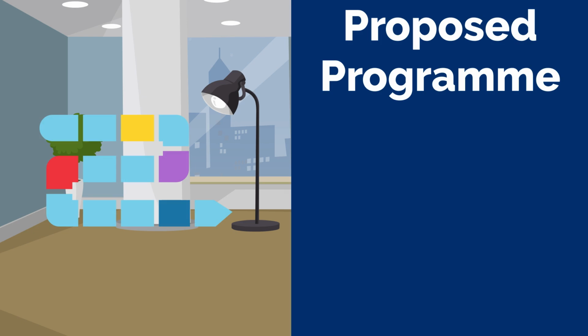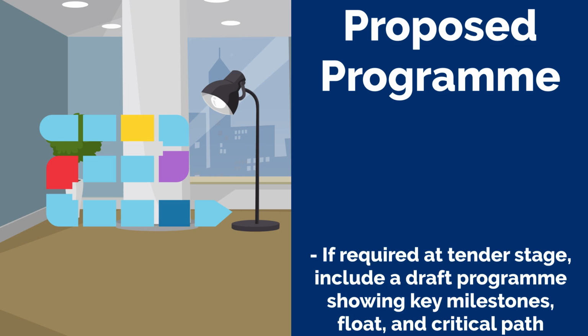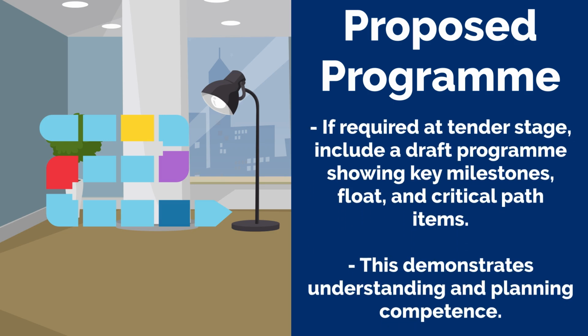Proposed program. If required at tender stage, include a draft program showing key milestones, float, and critical path items. This demonstrates understanding and planning competence.